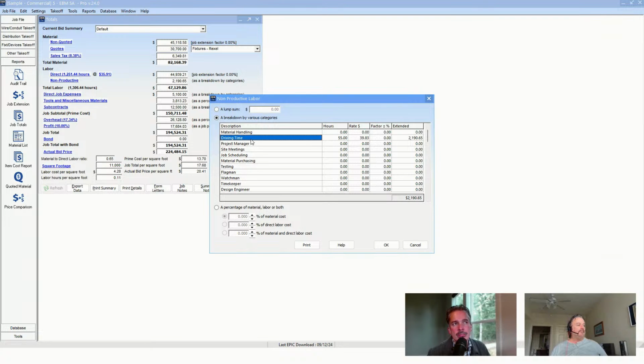That might occur more commonly if you're working outside of your normal area, or if you pay them once or twice a week to come into the shop, and the time they drive to the job is additional time. So you don't normally add for driving time unless you're outside of your normal area.